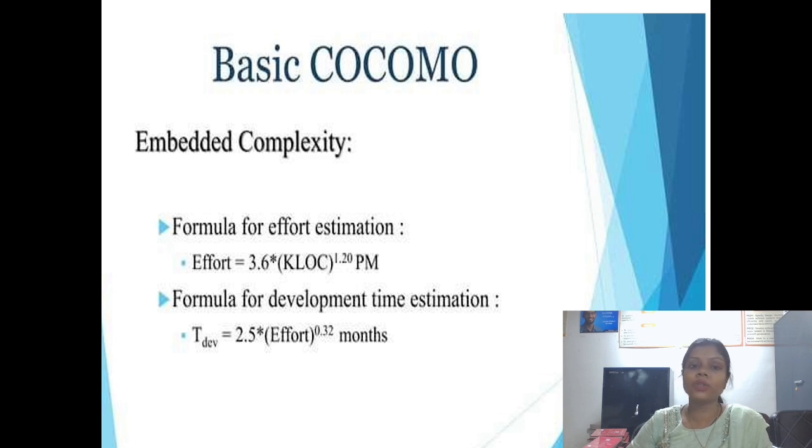Effort is equal to 3.6 into KLOC to the power 1.20 person-months. The formula for development time estimation is time of development equal to 2.5 into effort to the power 0.32 months. So that is the embedded complexity. In summary, the basic COCOMO model has organic, semi-detached and embedded. All these three types of complexities are there.